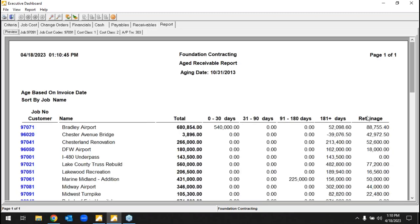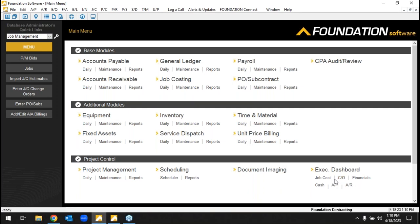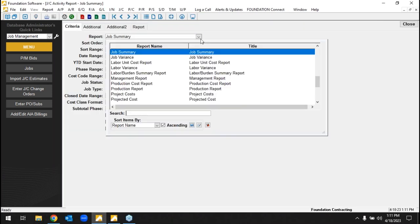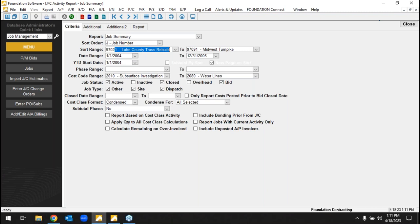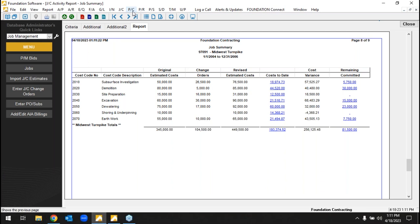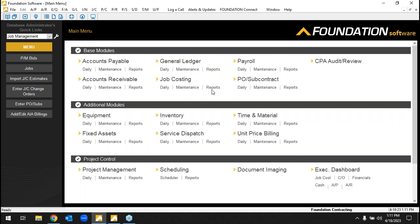Retainage management is another basic but helpful part of our system — holding retainage, tracking it, and releasing it when necessary. There are a lot of other job reports: super detailed ones, summary-level ones, all pre-loaded. I can run job cost reports not only by job, but also by customer, project manager, type of job, or division/profit center. Whether condensed or detailed, the visibility of the data is there, and as we do our day-to-day entry it's immediately helping the operations side.